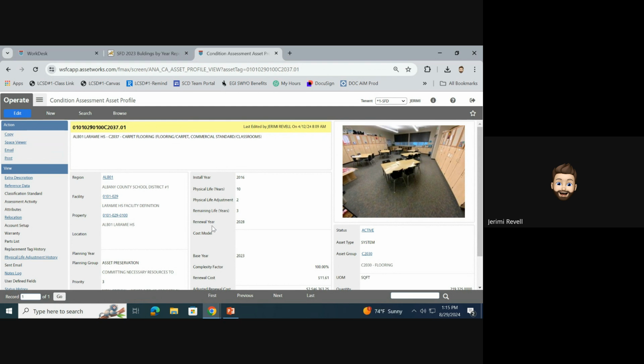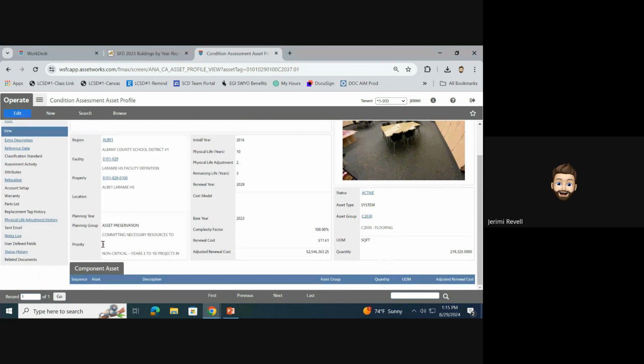Any pictures are available. And then down here, you're able to see what it scored as far as an FCA score goes. These costs right here and the quantity, square footage, all the quantity is right here. Please just keep in mind, any costs on these screens include the markups, no inflation. All inflation is calculated in the reports. So whenever you're looking at the screens of the database, just keep in mind that it does include regional and global markups, but no inflation.